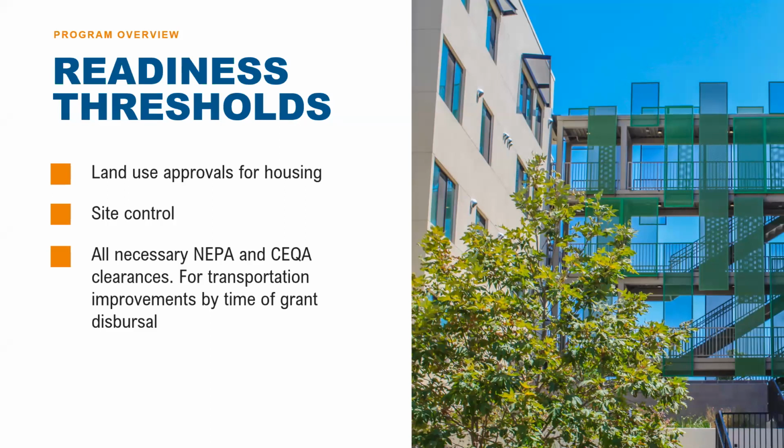Again, public partners are very important because they can help expedite the CEQA clearance, especially if planning departments can utilize CEQA exemptions or CEQA streamlining for infill affordable projects. Transportation projects are not held to the same environmental clearance threshold timeline, so just be very aware of that. For the transportation projects, these clearances are actually required by grant dispersal.